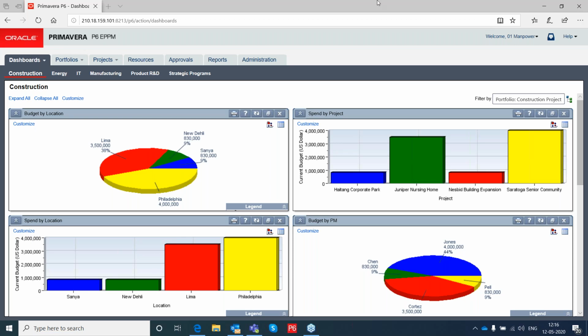See, what Primavera does is you have project preferences wherein you set which rate is to be utilized. The price per unit is defined for each and every rate. So you select the price per unit based on the project preference, and once you assign that resource to an activity, the units into price per unit will calculate and give you the total cost.